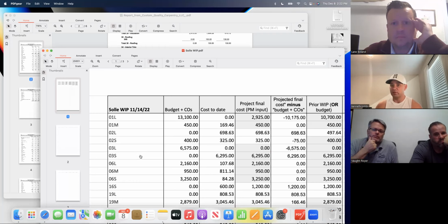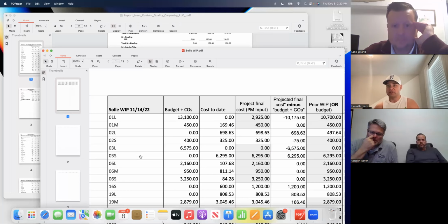And if they say yes, well, that just makes up $2,000 in grippage. They wouldn't have done that before, because if they didn't know that they were over budget, they would have just said, call whatever HVAC companies in co-construct and hired them and paid them $10,000. They wouldn't have done any extra. They wouldn't have hustled. They wouldn't have held the subcontractors more accountable.